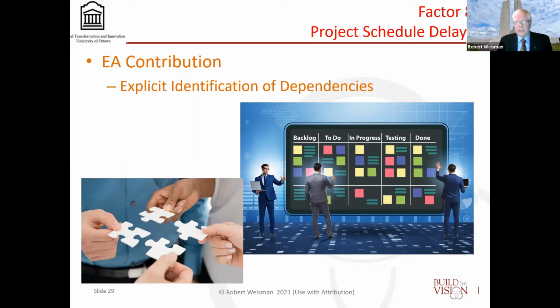For example, in one organization we were doing an audit on in the Canadian government, master data management was a fundamental requirement. Every project was dealing with it itself because nobody had identified it as a common service. As a consequence, you had multiple master data management systems, and I don't have to get into details, but that created a mess unto itself. So for the dependencies and the planning, enterprise architecture really facilitates that.